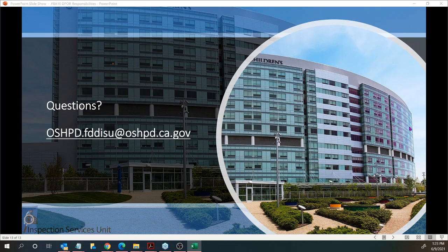And OSHPOD will quickly review the log of the non-material changes, for example, because it is your knowledge and your responsibility to determine, oh, this is a non-material change. So you move forward so that construction can continue, right? Because it doesn't need approval from OSHPOD. But suppose that OSHPOD is looking at this log and says, this non-material change in reality is a material change. Then that documentation automatically needs to be changed into a change order, ACD, and requires OSHPOD approval.